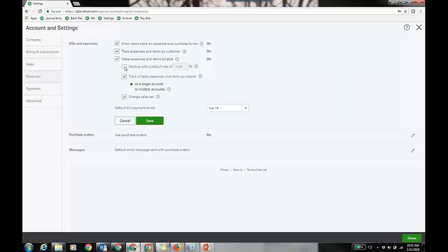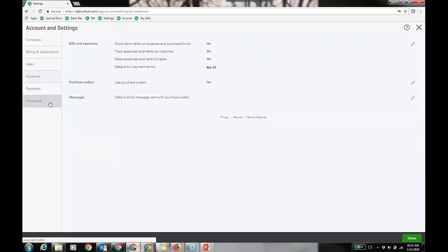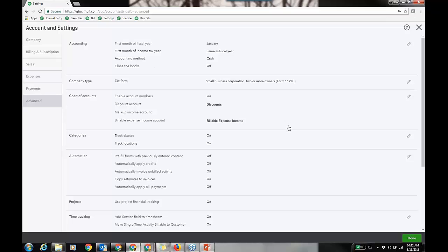Okay? And you can set a default markup rate. That's done here at this point. It's default for anything. So you might put a little one, and we'll look at that. I'll just do a 15%. I think that's pretty standard. Some do 25, 15. Right? So these are the ones you want to do for that. I'll click Save. And then the other one is time entry. I don't know if we'll do much with time entry.